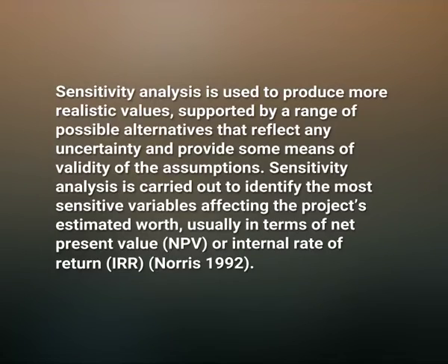Another technique is sensitivity analysis. In a project or investment, the data used at the planning stage are bound to vary and are therefore subject to risk. Sensitivity analysis is used to produce more realistic values, supported by a range of possible alternatives that reflect any uncertainty and provide some means of validity of the assumptions. Sensitivity analysis is carried out to identify the most sensitive variables affecting the project's estimated worth, usually in terms of net present value, in short NPV, or internal rate of return called IRR.